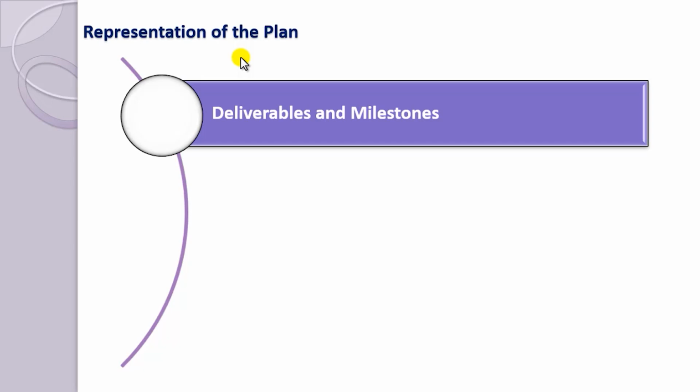So with all the work we have done, like estimation and planning, now it is time to represent the plan in a well formatted way. We need to understand the schedule is not the plan. If you go to the PMP certification books, the PM book, the project management plan constitutes the schedule and other things also, which is a huge template, and it is organization and project specific. So the schedule represents a group of timings that you have planned for your project. The total project plan comprises literally everything you have done in the project's planning phase.